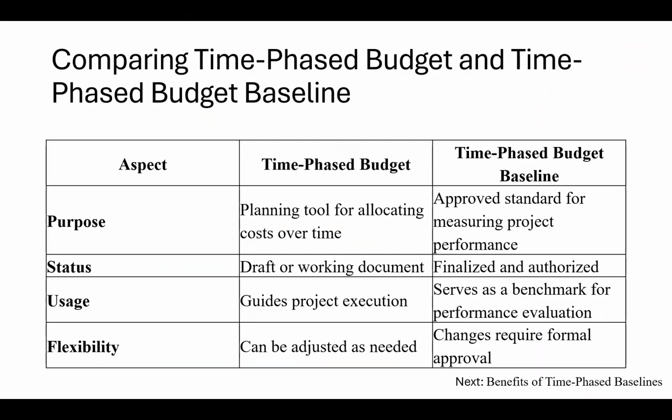Comparing time-based budget and time-phased budget baseline. The purpose of each. Planning tool for budget, standard for baseline. Status: it's a draft or a working document for your eyes only. But when it becomes a baseline, it's been finalized and authorized.